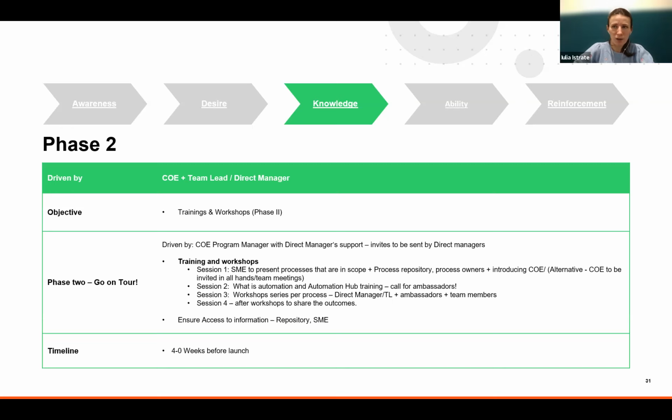And actually, after you prioritize and you decide that some areas, yes, are good to be automated, delivering that automation, because it's dependent on the capacity that your implementation team has. So if you don't have a big enough implementation team, then you maybe want to also adapt the rhythm in which you collect opportunities from the business and you engage with them. And a staggered approach might be more efficient.